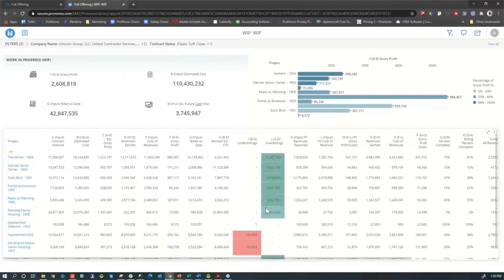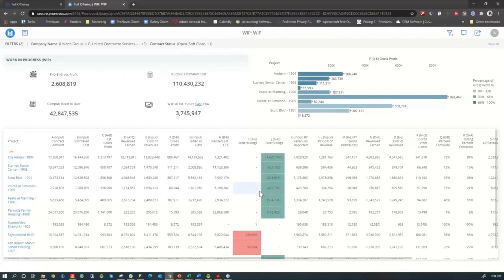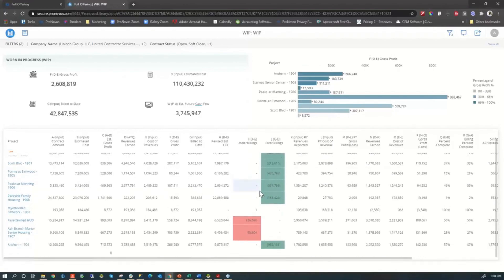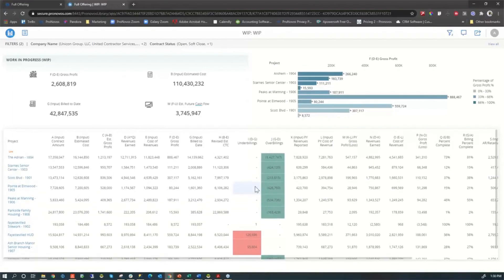We do work hard with our project managers to try to over-bill our jobs as much as possible given the slow pay times and 10% retention that seems to be pretty typical across most projects these days.